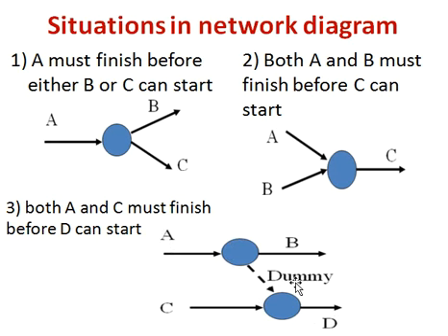As the name suggests, it is a dummy activity which will not involve any kind of resources. There is no utilization of any kind of time or cost. It is just introduced to complete the network, so the logical representation can be completed and further calculations can be done.